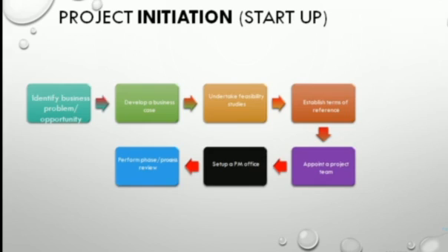Once you are satisfied with the feasibility study, the next thing is you establish terms of reference. You and your project sponsor will go through this business case and feasibility study, and once you are satisfied, both of you will come to an agreement and then sign the project charter, and from there funds will be released for you to carry out the project. Then also you have to set up your project team, who are those that will be assisting you in the course of the project.